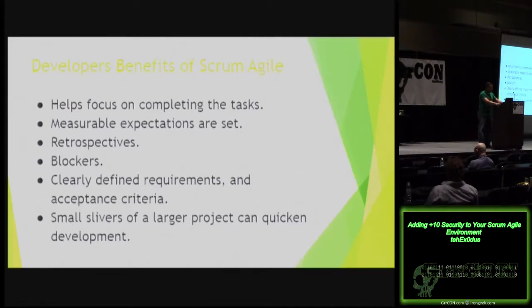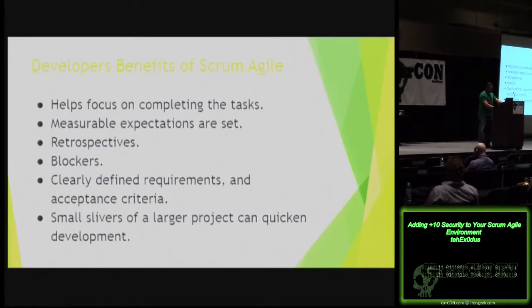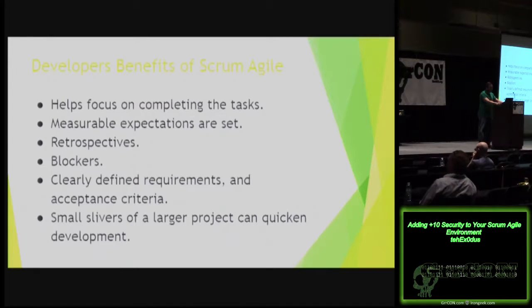After each sprint, in the retrospective, you look back and see if a task was grossly overestimated or underestimated — it helps keep measurable expectations in line. And because all those requirements and acceptance criteria are already defined when someone picks up a given task, you're not going to have scope creep. As tasks are completed, you have small slivers of the entire project start to layer on, and you begin to see the completion of the larger project without an open-ended date.